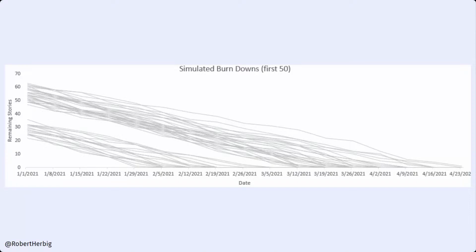But when you look at this kind of outcome, it makes it pretty obvious that there are really two worlds. There's a distribution, two distributions here, very bimodal. And so that is an excellent conversation starter to take to our stakeholders and say, look, this risk will double the time, or whatever the change is, right? We live in a world where the risk does materialize or it doesn't.